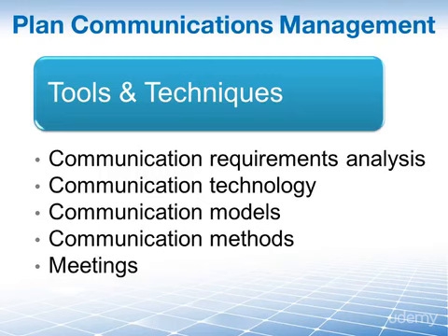Interesting enough, when I check the PMBOK guide, plan cost management uses meetings, plan quality management uses meetings, plan human resource management uses meetings. And I checked every single process in the PMBOK guide, and what I found is that as soon as the process begins with plan followed by the knowledge area, so plan scope management, plan procurement management, etc., meetings is a tool and technique.